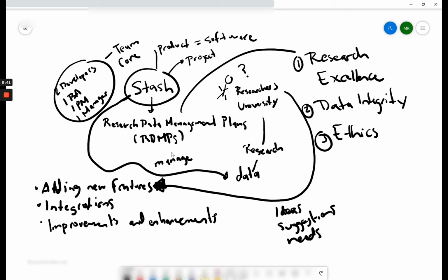So our sprints are 2-week sprints. Fortnightly. And every month we're doing demo sessions for the board, and we're showing different stakeholders our progress. We're doing every fortnight also demos before the monthly board meeting. So with our product owner, we're showing them our progress before we go to the monthly board meeting.